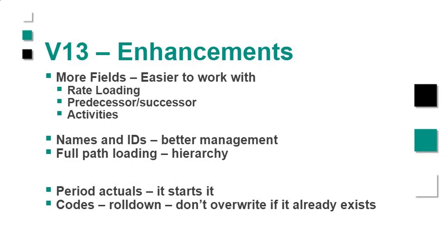And I know I use this a lot in my work here in the IT program because they kept changing the logic. So instead of redoing thousands of logic ties, I would just take the logic sheet out and filter on the different activities I knew that I needed to build logic on and reload it. So it was a huge, huge time saver for me.